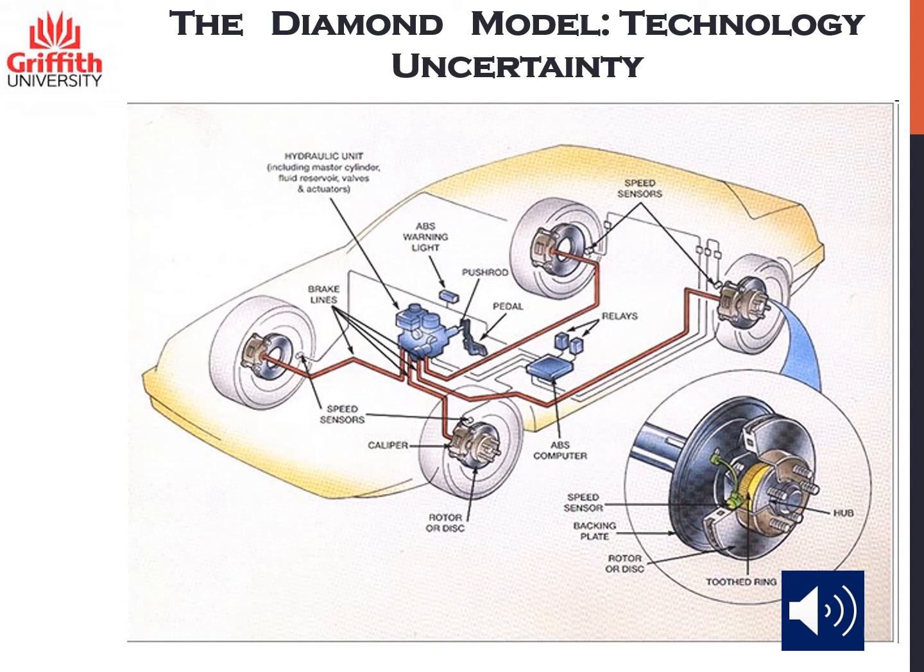This means that technology uncertainty has an impact on the design and testing stages of the product, on communication and interaction among team members, on the timing of design freeze, and on the number of design cycles that we need in order to develop our project.